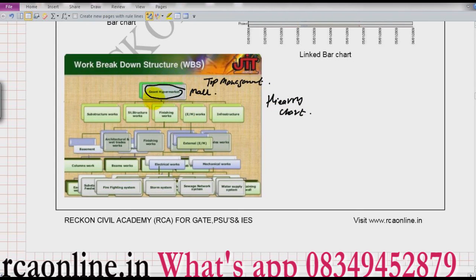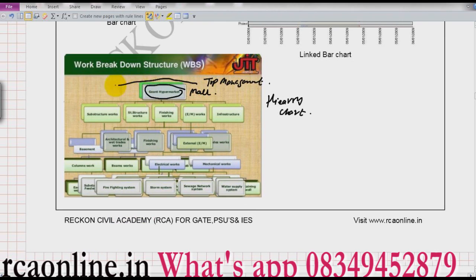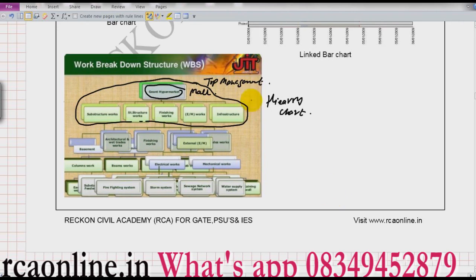The top part of the hierarchy is the construction of the mall. Underneath we have different activities. The main aim is construction of the mall with different activities beneath it. This is the first type of chart that can be built to summarize the project and to make clear what the total project will look like. Management is more concentrated on the first two levels, and then middle management will look after the smaller activities. So work breakdown structure is mostly for top management to understand the total work.